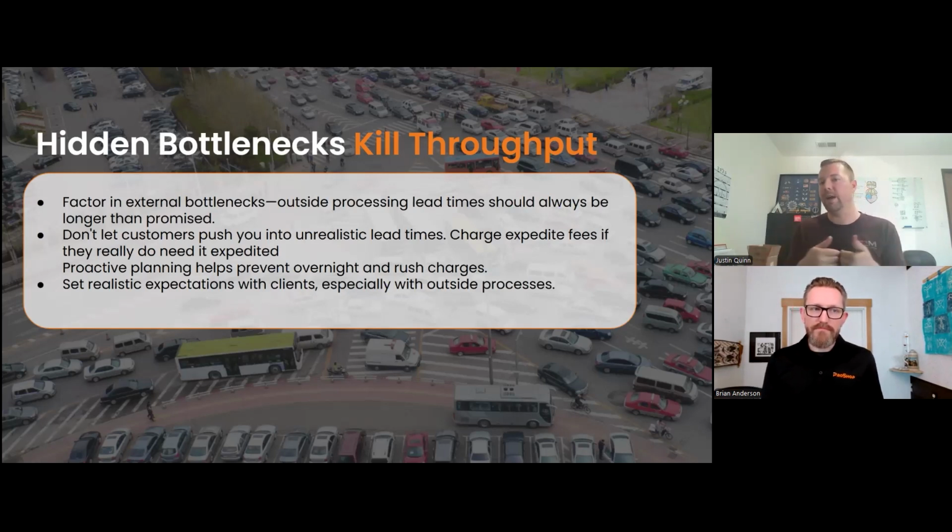We have an internal lead time for our quality department, and it's 2 days. So anytime we have an inspection line item, it automatically builds in a 2 day buffer onto our schedule. And thankfully, we are efficient enough that we constantly beat that. But that's where we pick up a day in our lead time, right? If we plan for 2 days in inspection and it really only takes 4 hours of one day, now we've just gained a day and a half on our lead time that we could use somewhere else or deliver early to the customer.